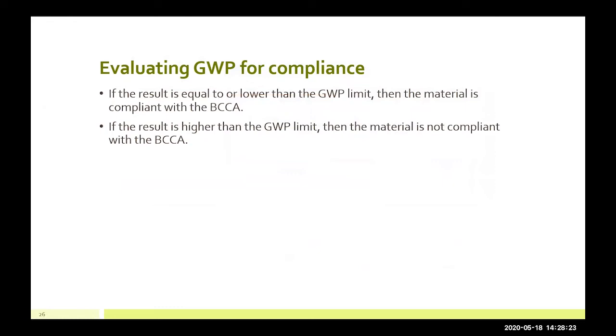At this point, when you have a non-compliant material, the awarding authorities have built-in exceptions within the legislation under Public Contract Code 3503E. The Act calls out qualifiers such as technically infeasible or resulting in a sole source. So it's up to each awarding authority to determine whether the project they have on their desk meets one of those eligible criteria to not apply the Buy Clean California Act. That's a case-by-case basis, and it will be up to the awarding authorities to decide.